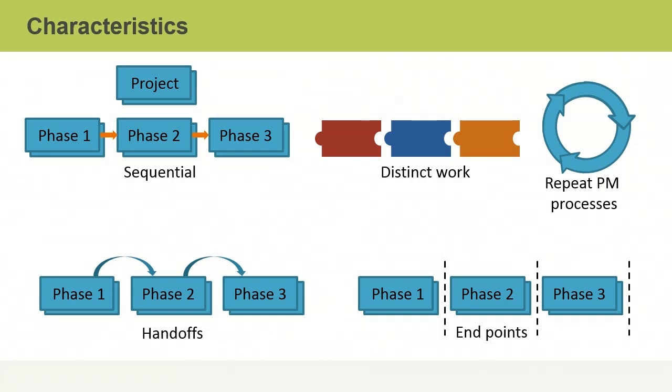Phases in a project have several characteristics. They are sequential. They each involve distinct work. They repeat the project management processes from initiating through closing. They each end with a handoff of work called a deliverable. Finally, they have natural endpoints at which the continued viability of a project is assessed. The endpoints are sometimes called gates.